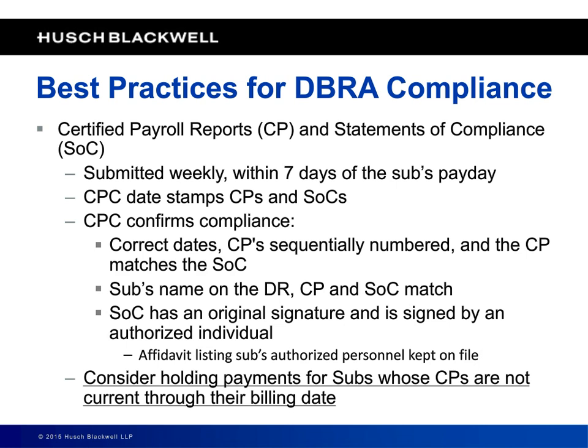Well, that's going to trigger you knowing that you need to go back to your sub and say, look, you got to get a 1413 for this guy. And oh, by the way, I'm not going to pay you until I have all the documentation demonstrating compliance for both yourself and all your subs, Mr. Subcontractor.